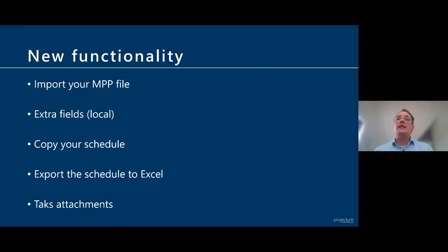Bear Norman asks, has the limitation on the number of tasks within a single project in Project for the Web changed, or is it still 500? Very correct. If I remember correctly, Per says, this is still a limitation. In Project for the Web, you will not be able to add more than 500 tasks yet.